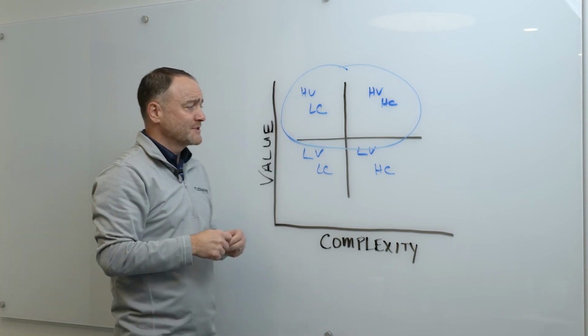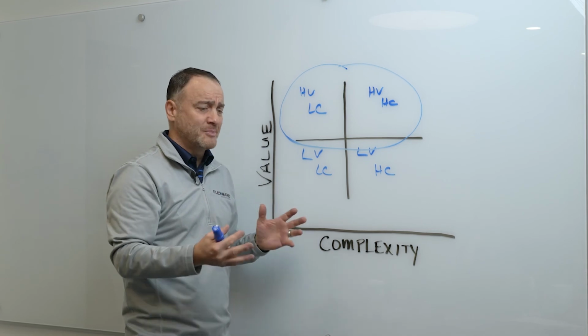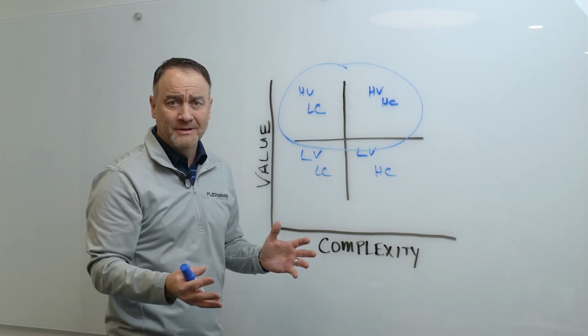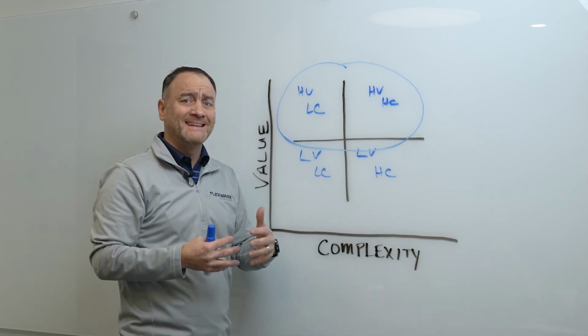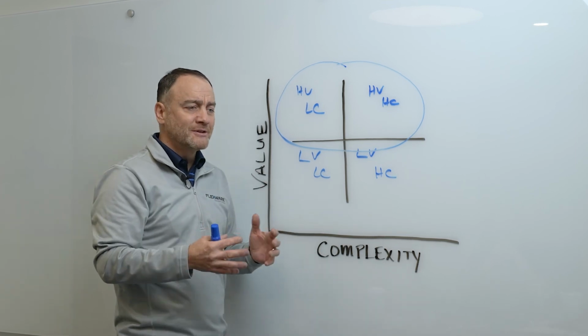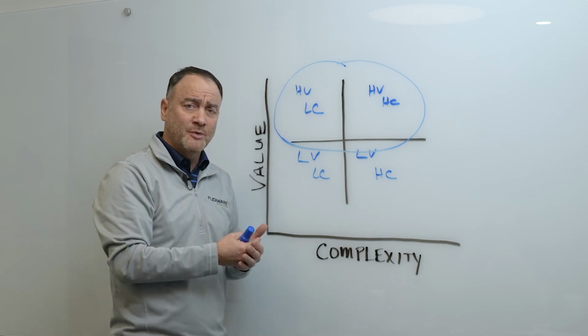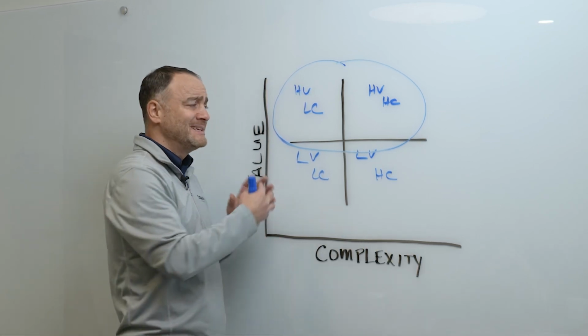One of our customers came to us, they want to start on this journey, and they didn't even realize that they had 9 plants, that all of their equipment was not even connected properly. Nor did they have a good data table, data map for where all the data inside of those devices was hidden. So it literally turned into about a $700,000 project just to get all the equipment on Ethernet, to table the data, to understand what they had, to even begin this journey.